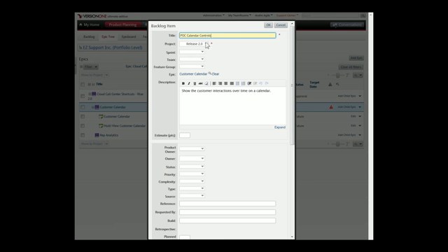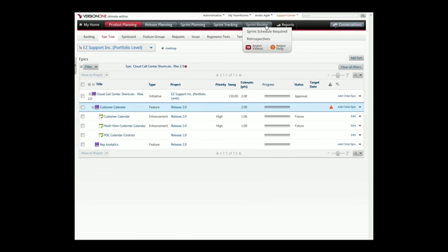Now, as Mike mentioned, this item you wouldn't want to start in Release 2 because that would mean you haven't reduced your risk. So I can move that item back into Release 1 to make sure it gets covered in that time frame. And the team will go ahead and figure out how to estimate that later on and make sure that from a technical side we have confidence that we know maybe what calendar control or library we're going to use in order to implement the calendar feature we're looking for.